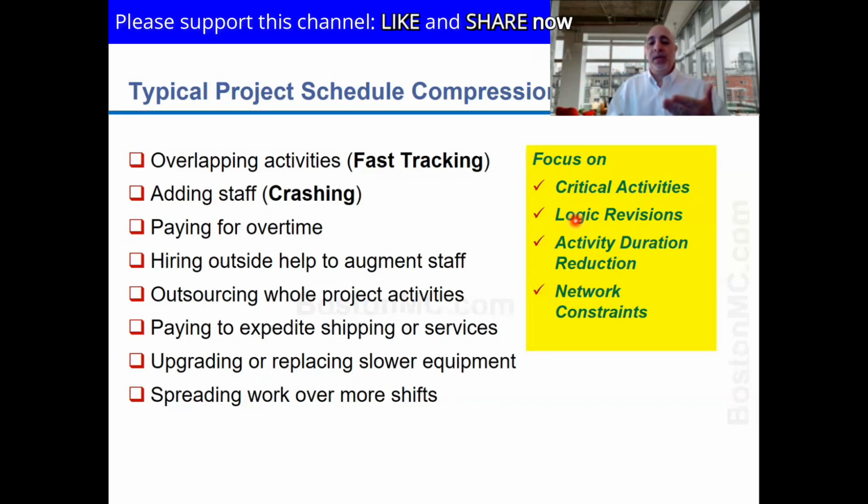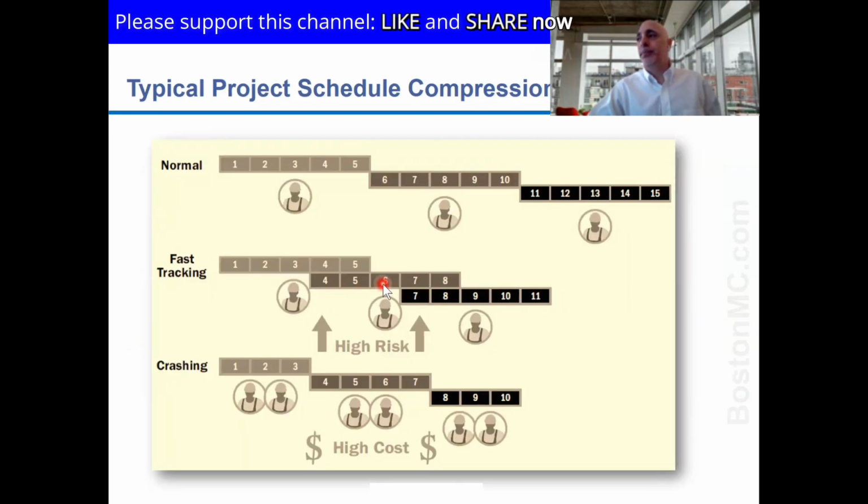But instead, you could do the first floor on the first day, start painting the second floor on the second day, but also paint the second coat on the first floor. So you really need 5 days in the end, because you start to start. So you can look at logic revisions here. You can try to increase your productivity rate, or change the way the activities are connected if they don't need to be connected in a specific order.